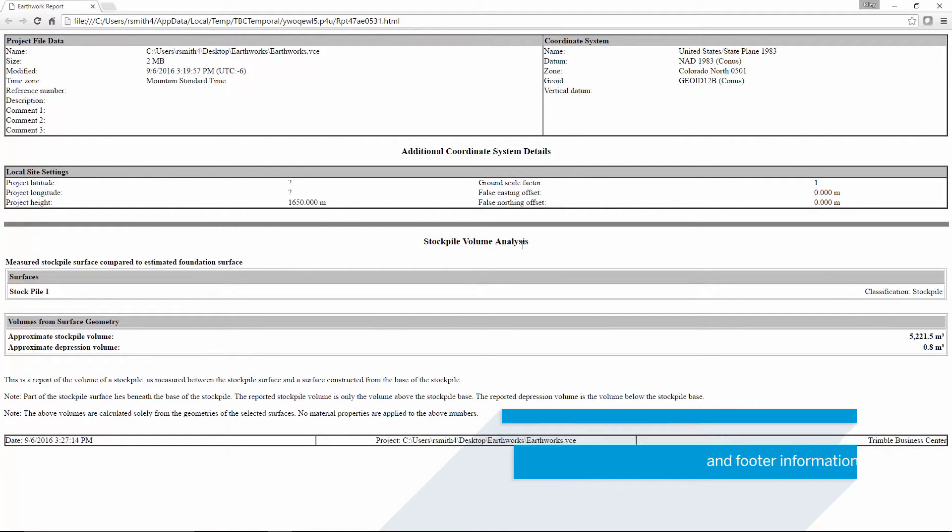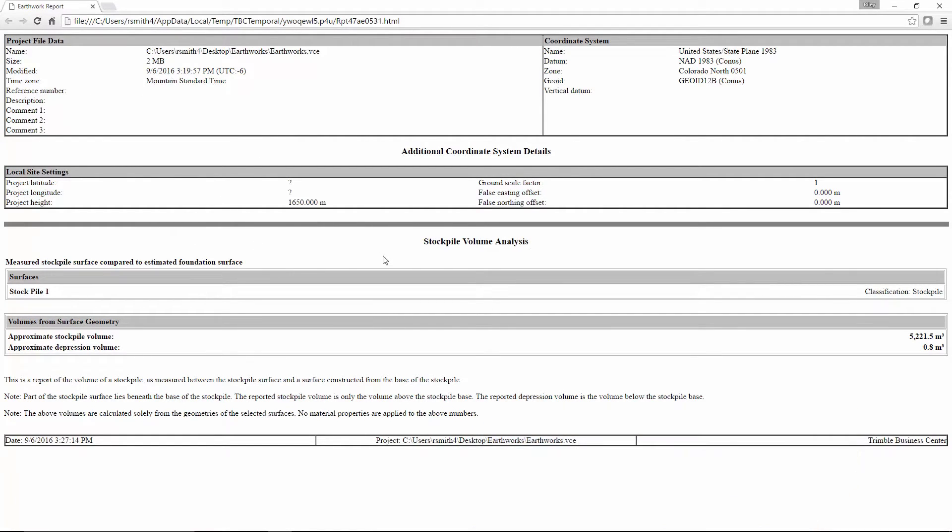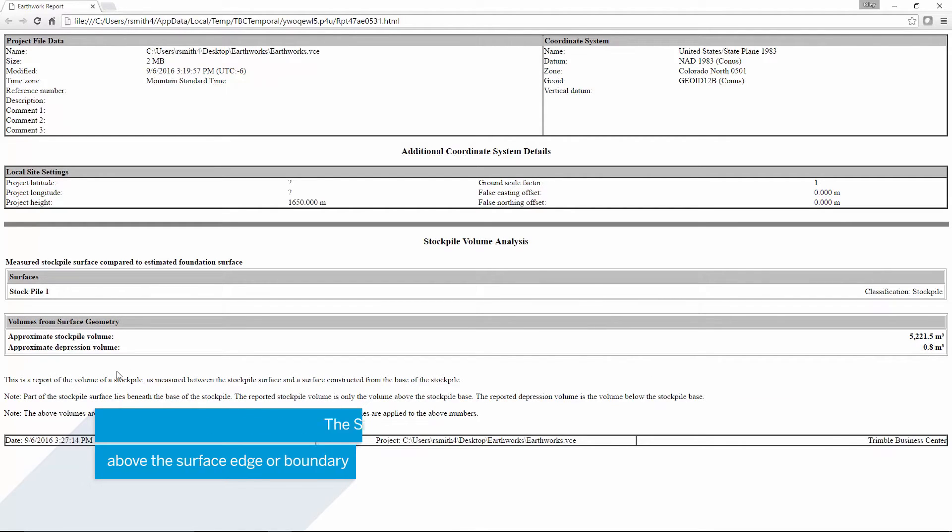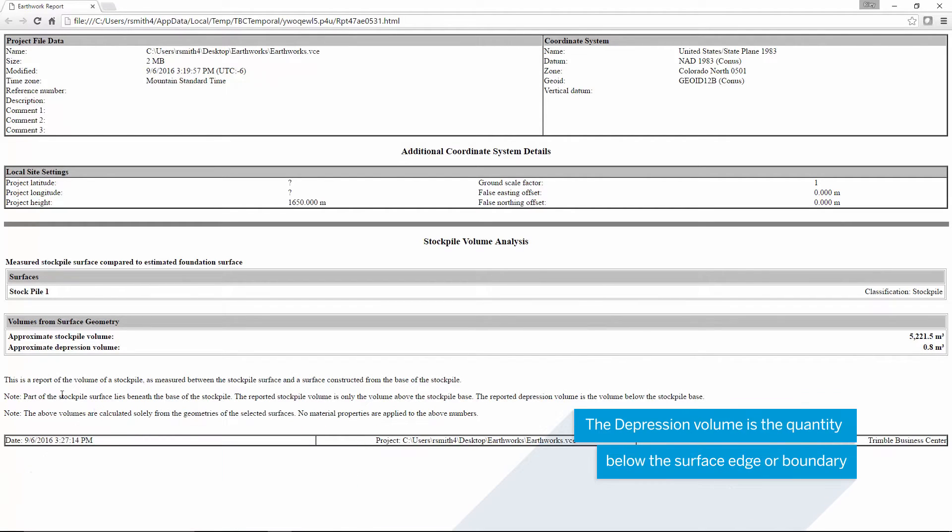The volume analysis section has the surface name and classification with the calculated volume. In this case, there are two quantities stated here. The stockpile volume is the area above the surface edge, and the depression is the area below the surface edge.